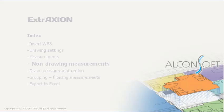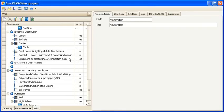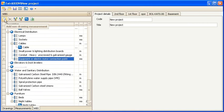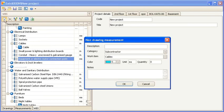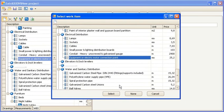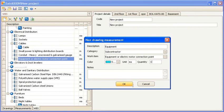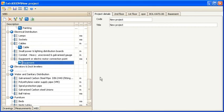In addition, it is possible to add non-drawing measurements of objects which are not depicted in the drawing, or measurements that do not need to be marked on the drawing. You can add non-drawing measurements directly from the WBS tab using the Add non-drawing measurement button. Then, in the pop-up window, you can specify the measurement details and then affiliate it with its corresponding work item. You can then enter the totaled item quantity. The item quantity also appears in the WBS tab.